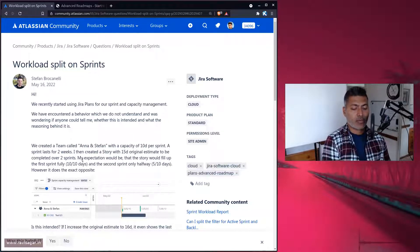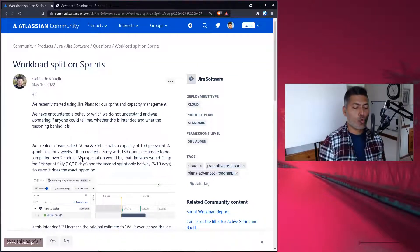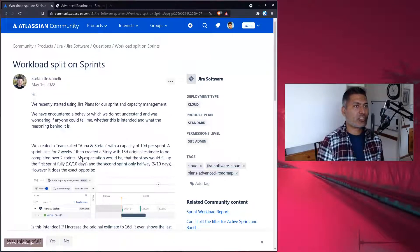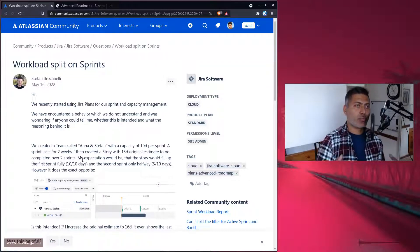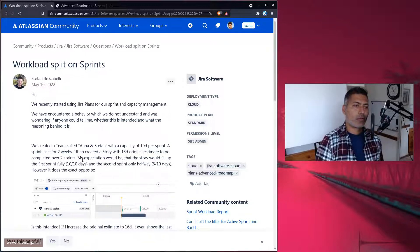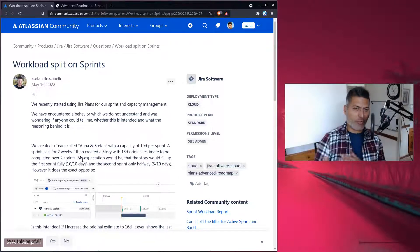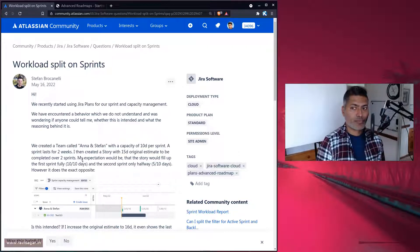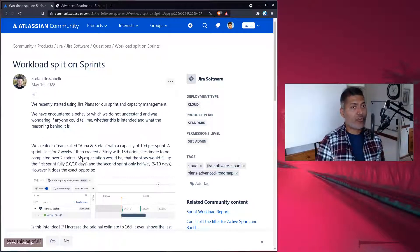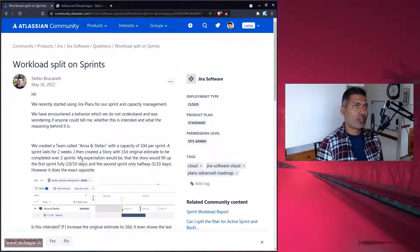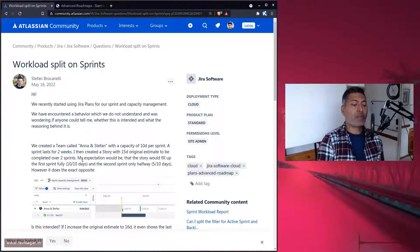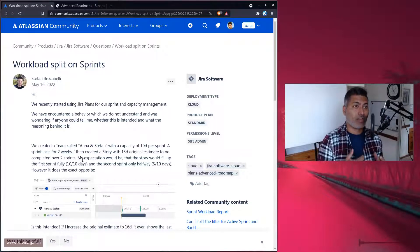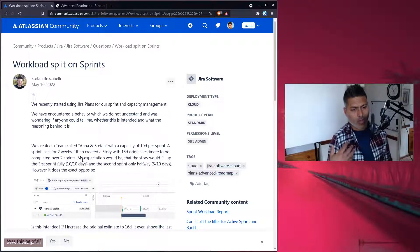When you have this hierarchy, you can feed in your number of items that you want to deliver, and you can always start from the very beginning. For example, your initiative might be that you want to capture the UK market or the US market by end of quarter three this year. You can start with this high level, break it up further, define your work, and ask advanced roadmap how much work you can deliver in the next sprint or next release, and by when you can release it. You can also have fixed dates to release, and based on that date you define the scope to maximize delivery.